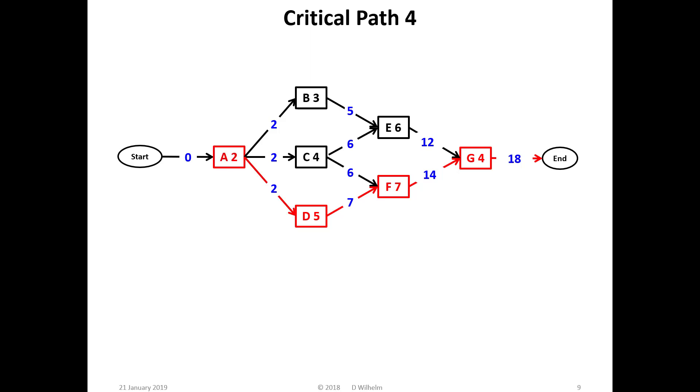Task D only has one prerequisite, so task A is on the critical path, and the critical path is expressed as A, D, F, G.